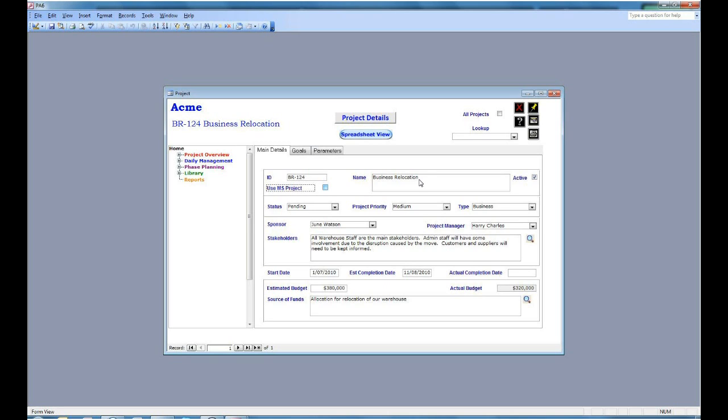On the left we have a box to use MS Project. This determines whether you will use soft project to do your scheduling or use the built-in functionality within Project Administrator to do your scheduling.